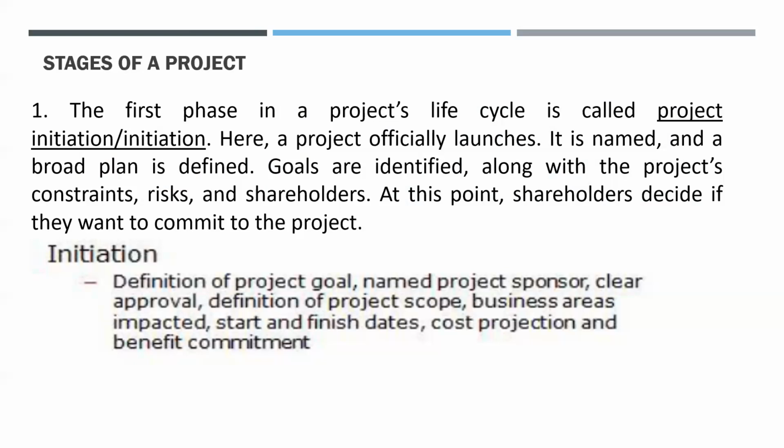It is the process necessary for documenting the business needs and the new product, service, or other result that is intended to satisfy those requirements. This chartering links the project to the ongoing work of the organization and authorizes the project. Projects are chartered and authorized external to the project by the organization, a program or portfolio management body.